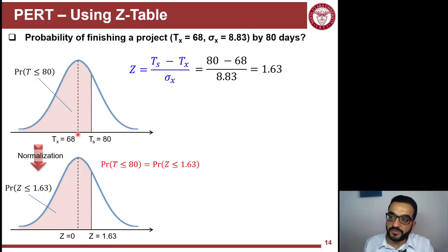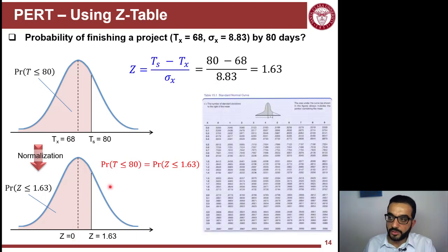Of course, the z value that corresponds to the mean is 0, right? So that's the point. Normalizing here means that the mean of the distribution is not a value that is a duration value. It's actually now equal to 0, and that will simplify the way we calculate the area under the curve, because normal distribution is pretty useful representing natural phenomena, but it's very hard to deal with statistically and mathematically.